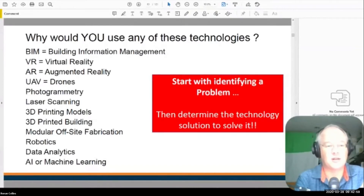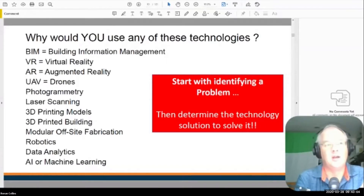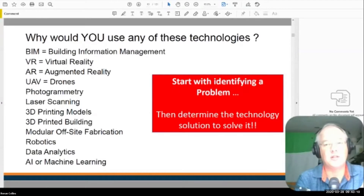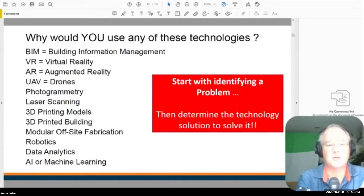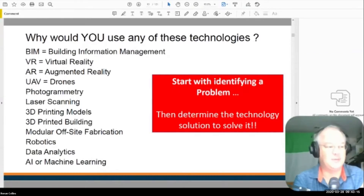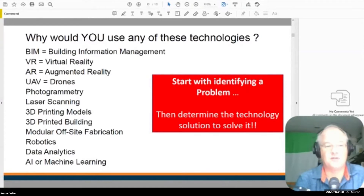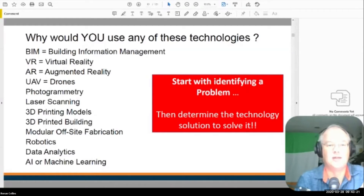What we do in our organization is we define the problem we're trying to solve. For example, with the tunnel boring machine, we were trying to improve productivity and wanted to know if we could do self-driving tunneling — only for the drilling operation. We wanted to see if we could improve productivity, and we've done that. We've got a 10% to 12% productivity gain, so we know the software, programming, and hardware we invested in has been effective.